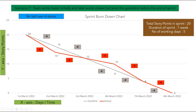In another scenario, the team works faster initially and then slower. On the first two days, the actual line is below the guideline — the team is working faster. On days 3 and 4, the actual line is above the guideline — the team is working slower. By end of day 4, the team joins the guideline, and on the last day burns down 4 story points, completing all 20. No action is required in this scenario.